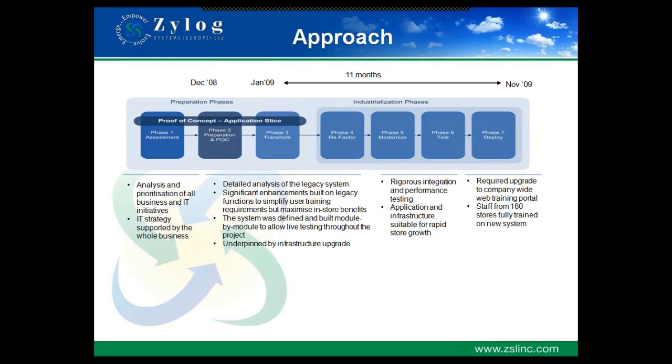Within these 5 weeks, we finalized the approach, the objectives, and the requirements, and we also reverse engineered their existing application. We produced a detailed technical document, which we reviewed with the client, and we got the client to confirm that that's exactly what their current system is, and that's exactly what they're looking for in the new system.